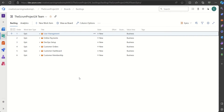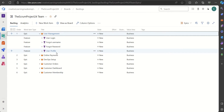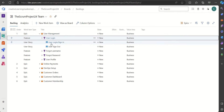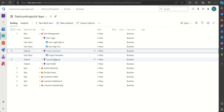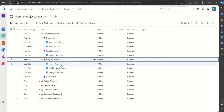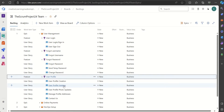If I click on any epic it will expand. The User Management epic consists of four features: User Login, Forgot Username, Forgot Password, and User Profile. The User Login feature consists of the User Login story and User Sign Out. Forgot Username has the Forgot Username user story. Forgot Password consists of Forgot Password, Send Temporary Password, and Change Password user stories.